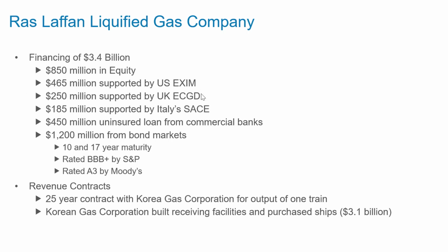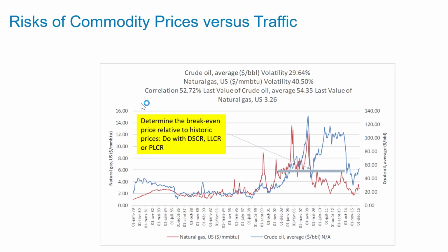They got some export credit agency financing. This is the Exxon, I mean the Mobil and the state. And the big one is here. They were able to get 1.2 billion out of the 3 billion. They were getting other people's money, and this was rated above investment grade and even A3. Okay, and then it's gone up since then. And that's how they put it together.